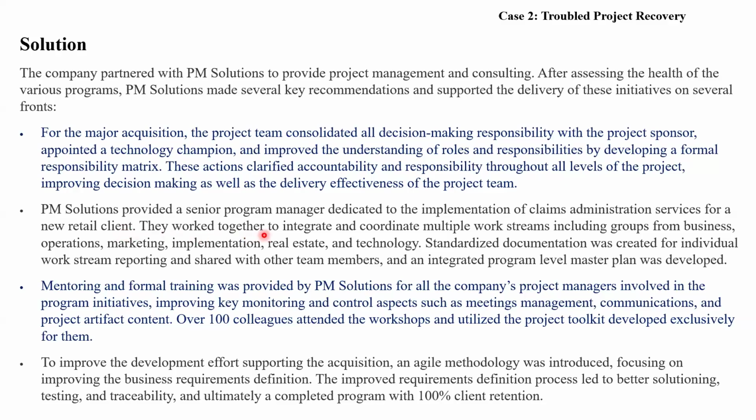They worked together to integrate and coordinate multiple work streams, including groups from business, operations, marketing, implementation, real estate, and technology. Combining all these things, this project manager was able to coordinate with all these people related to all these activities. Then standardized documentation was created for each individual work stream, supported and shared with other team members, and an integrated program level master plan was developed.